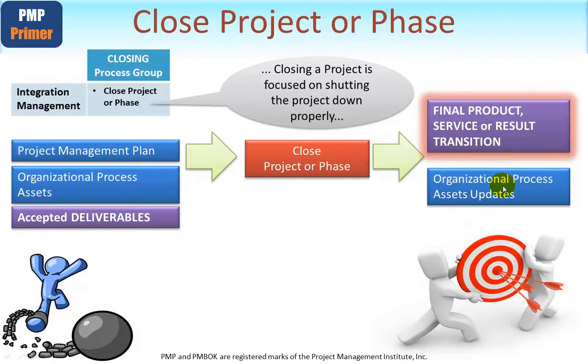Now, the main purpose of closing a project is about making sure all necessary documentation is dealt with, and most of it will need to be archived. Capturing the lessons learned: if you have a lessons learned log, then the project manager may take that information and produce a report and hand that and the information on the log over to, for example, a project office so that these lessons can be passed on to future projects.